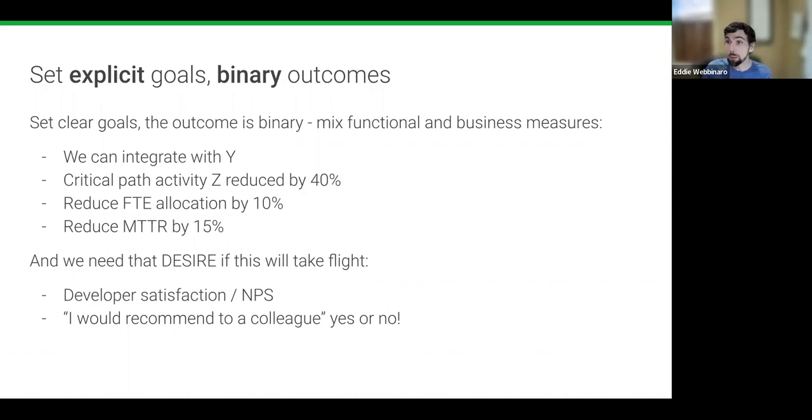Now, some folks will say, I know, Eddie, you're ranting about build times, but I want to make sure we get build time under a certain window or in some time frame. That's okay. Where my team's really going to press you, though, is to understand where that activity falls on the critical path, and that it is in fact on the critical path. That if we really reduce this time, it's ultimately going to impact the end delivery of value, learning, experimentation, and what that 40% marker is meaningful for, right? What does that actually achieve in some sort of outcome that is different than today?